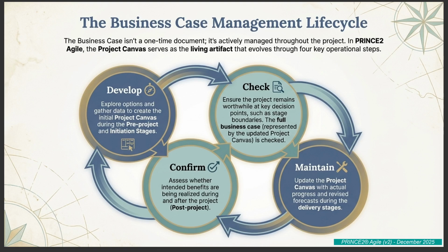Right. And between those formal checks, we have the ongoing effort to maintain the business case. Now, how is this different from just day-to-day monitoring? Is the PM just constantly updating this document? That's a great question, because that's where the practitioner needs to be clear. Maintaining is not just BAU monitoring. It's an active, mandated process of updating the canvas when specific material things happen that affect the justification.